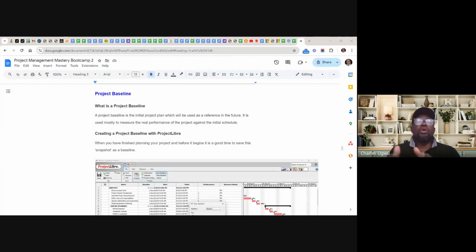So if somebody wants to audit your project, the first thing they want to look at is your baselining. If you have had up to 4 baselines in your project, you must have a reason why you have up to 4 baselines. If you want to have any change after baselining a project, you must have a reason for another change, and it must be approved.